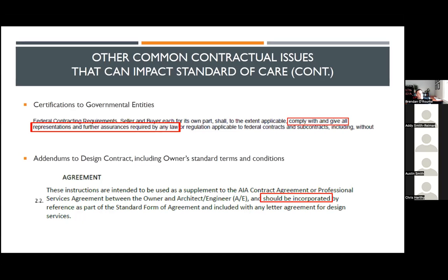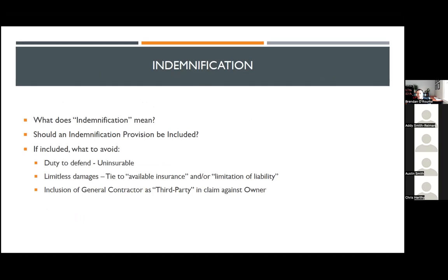And when dealing with the negotiations or the pushback on the owner on some of these terms, I often phrase it, working with either the owner or their counsel, as: we're just trying to get this back within insurance coverage. It's no benefit to the owner to have claims against the design professional that are uninsured. In the event that they are uninsured, they're going to be chasing the design professional for its computers and copying equipment.